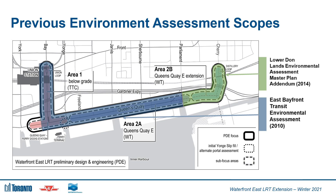These environmental assessments have a 10-year shelf life, which is currently expired for the East Bayfront Transit EA, and any changes to the design or environment that have taken place since the original documents were published need to be documented. For that reason, a new environmental assessment process is being initiated to cover the entire transit corridor from Union Station to the Distillery Loop.